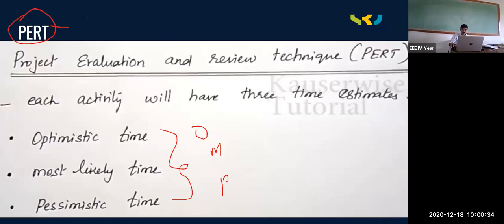So as far as PERT and CPM are concerned, friends, what you need to remember is that PERT is Program Evaluation and Review Technique. It is used for those projects where the time estimation is not known. Please keep it in mind. PERT is used by the project manager where the time estimation is not known, for R&D projects or new innovative projects. Coming to CPM, the critical path method, the time is deterministic in nature, meaning time is already known. It is used for repetitive projects.